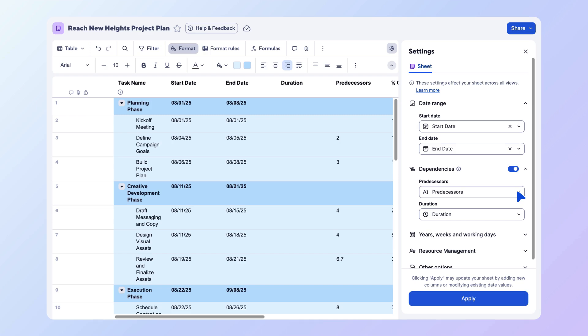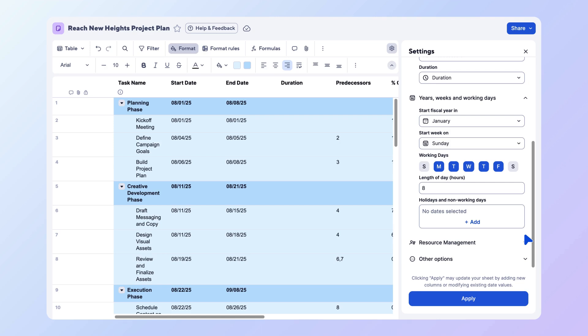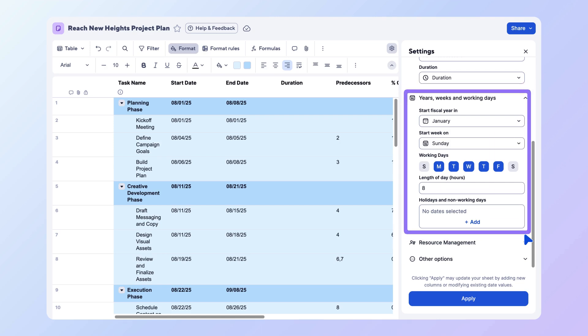Next, we'll adjust the working time by selecting the working days dropdown. Here you can set when the fiscal year begins, the first day of the work week, the number of hours in a working day, and any holidays. If you leave these blank, your sheet will use the default settings defined by your plan system admin.